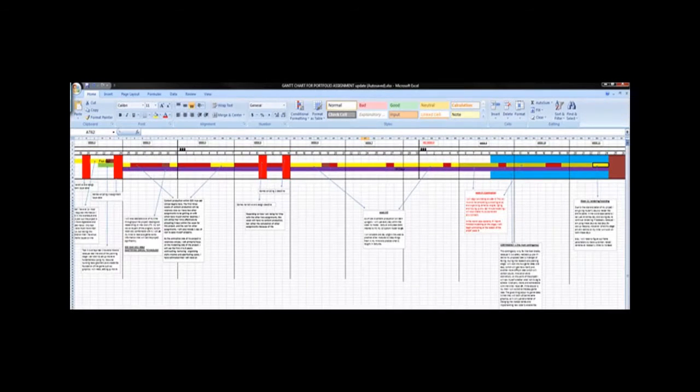The most important part of the process was the planning of it. This consisted of me constructing a Gantt chart that had a day-by-day progression plan over the given project time. The chart broke down different key aspects of the design stage such as content production, etc. It also highlighted important dates such as rest days, dates for other assignments, contingency areas, and the deadline date.